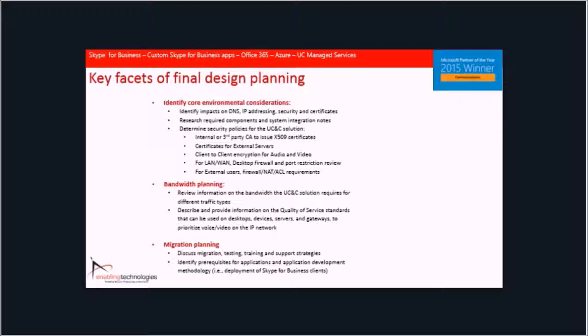And then finally, what is our plan for migration? And some of this will dovetail into what we talk about here in the next section around proper change management, but have a plan, right? Don't just get your Skype for Business in the cloud or hybrid or on-premises, whatever it is, in great shape and think it's good and turn it up for the IT department, let them bang on it for a week or two and say, hey, we're ready for our general release. That's not a plan, right? That's not a strategy. Go back to your usage profile discussions. Remember what you found out as far as early adopters, later adopters, feature sets, that sort of thing. Craft and adhere to an actual migration plan. It'll reduce your stress by 90% and make things that much more pleasant for the users as well.